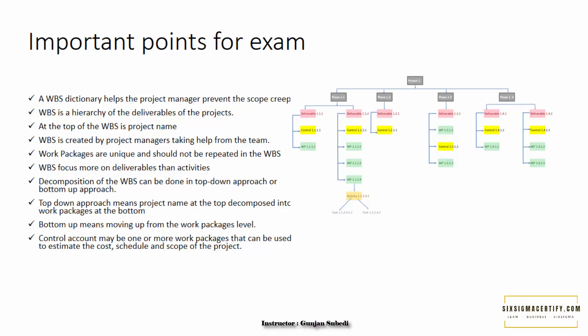The decomposition of the WBS can be done in a top-down approach or a bottom-up approach. Top-down means we write the project name at the top and decompose into work packages at the bottom — as shown in the picture. Bottom-up means moving up from the work packages level. We also have the term WBS dictionary.